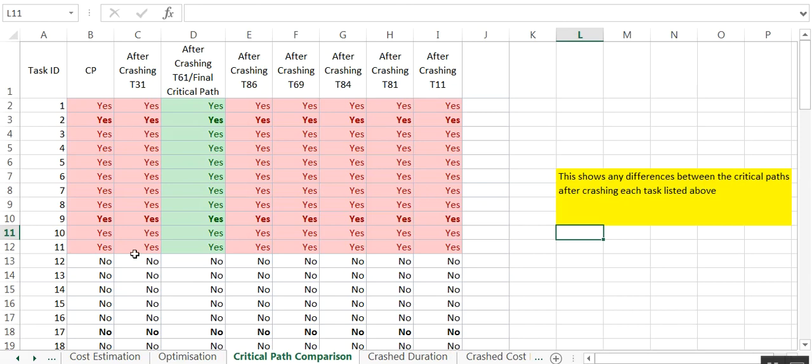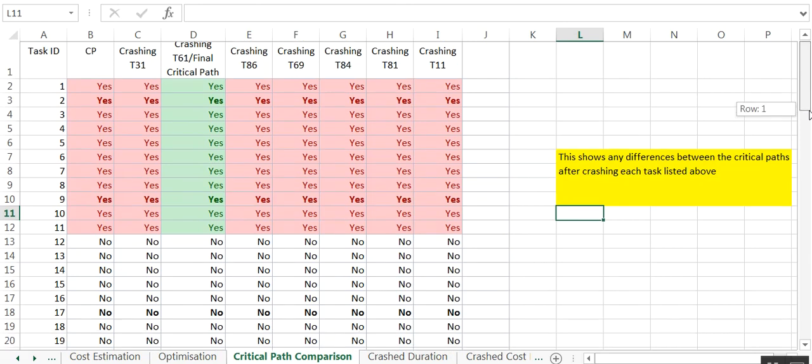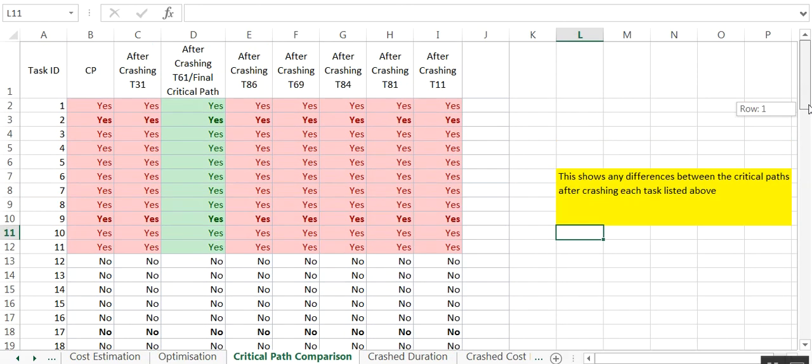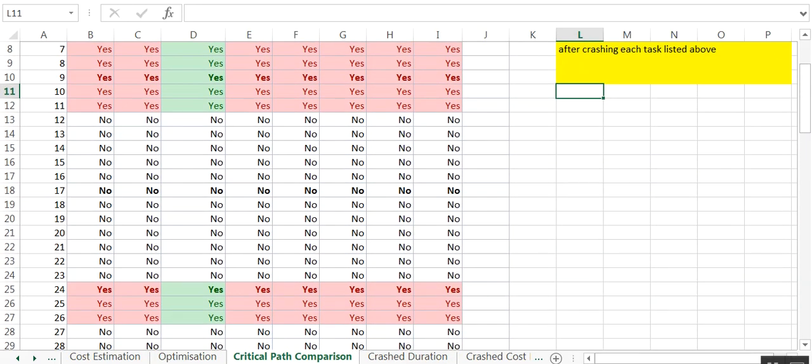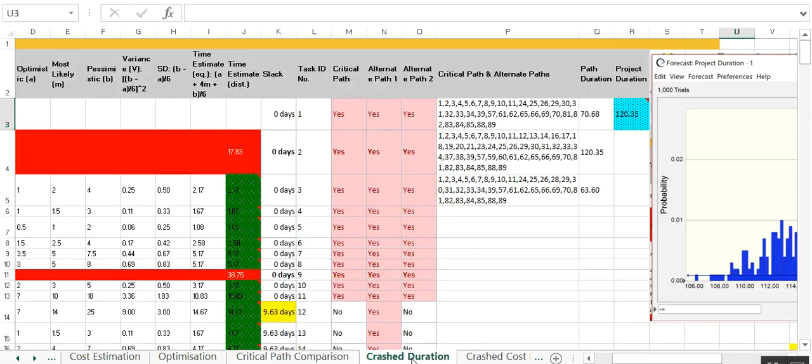This is excellent. They've done all the critical path comparison. I think they've done this by crashing by bundles rather than necessarily crashing by day. They could just keep this and write a note saying that they did check this on a daily basis, or that there was no indication that it would make any difference on other activities, so that they've looked at it. I think in practice it won't. Okay, but just a note.